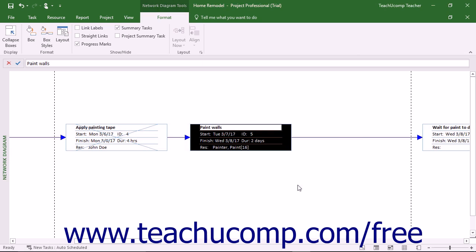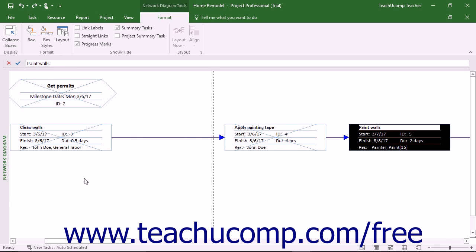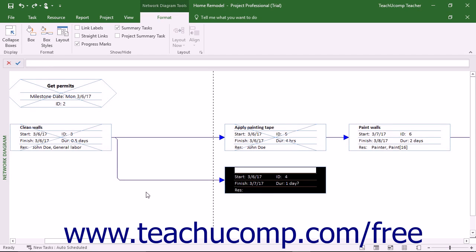For most project files, you will see dashed lines that represent where page breaks will appear in the view if printed. You can click and drag in the empty space in the view to create a new unlinked task shape. You will then need to enter the details of the task. You can also create a new linked task by clicking and dragging from an existing task shape, then enter the details of the new linked task.